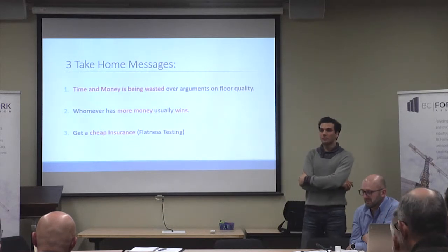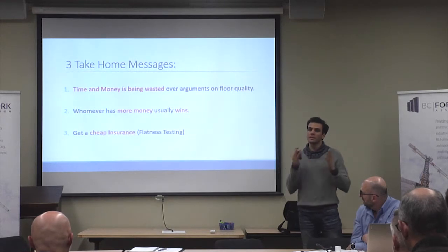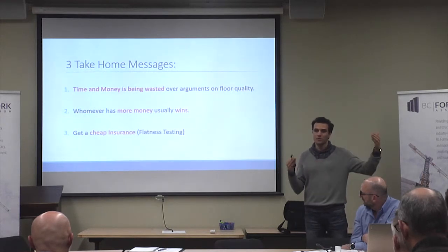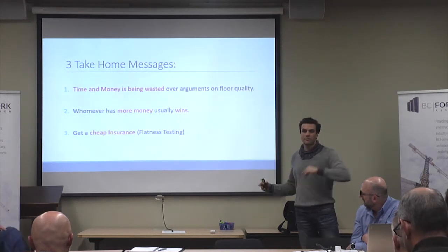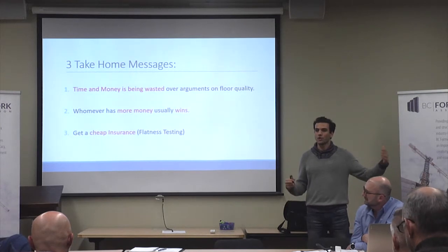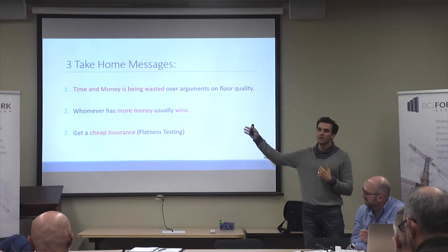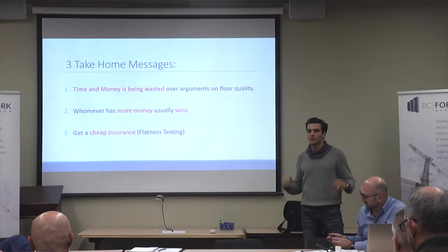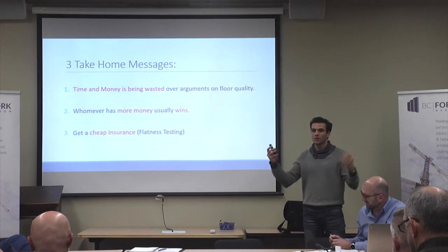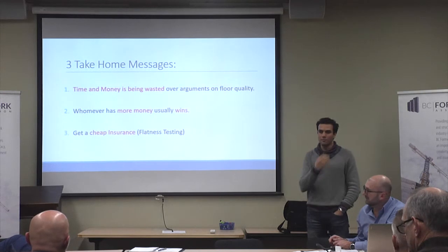Well, the thing is, our machine measures and calculates a number. Now, it's based on the contract, what numbers you are comparing this against. So the 25 may be a pass in this project, but maybe a fail in another project. So basically somebody tells us this is the spec, then I'll go test. If it's higher, you pass. If it's lower, you fail. But again, you can't compare two projects to each other, because every contract is different.